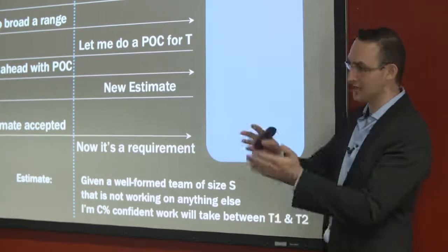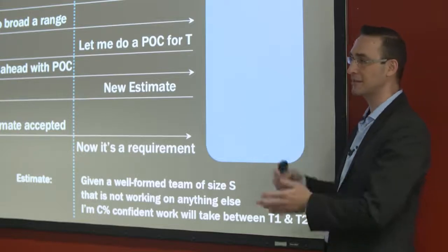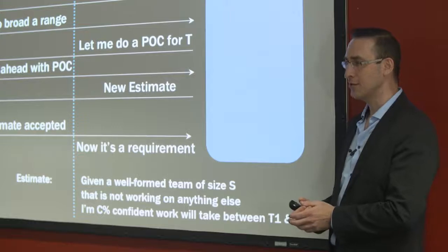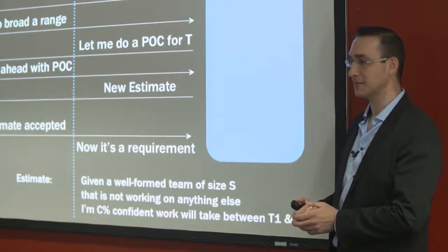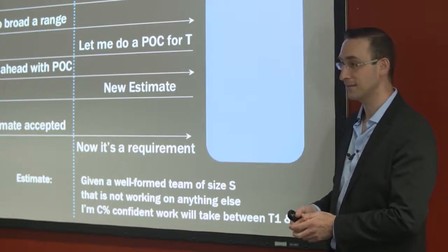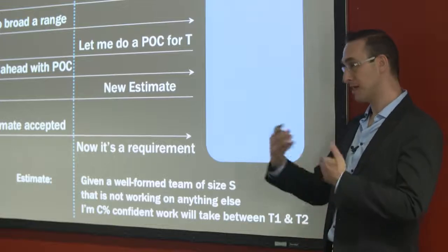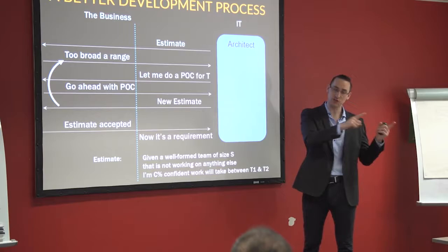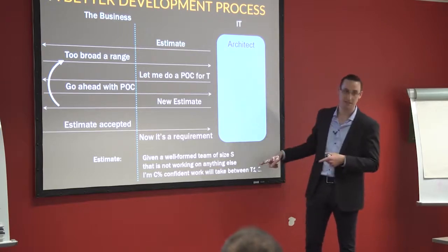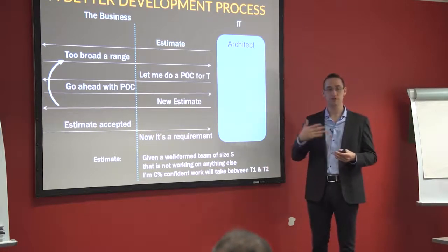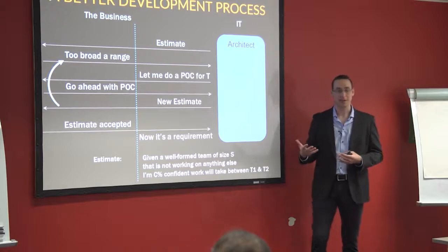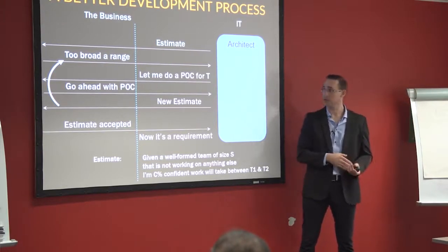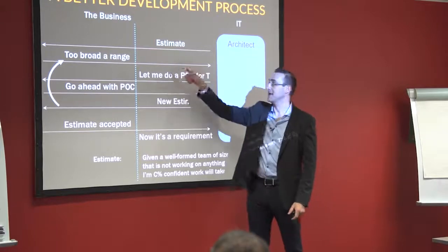Or between, let's say, middle December, middle January, all right? Now the business might say, 5%? You're saying it's almost impossible that it'll be done. Yeah, I'm 95% sure it won't be done by the end of the year. That's a better form of communication, right? The issue here is not that if we can't do 1 estimate now, let's do 4 estimates, but rather it's a tool for us to communicate and document the likelihood of a given outcome to allow business stakeholders to make better decisions.